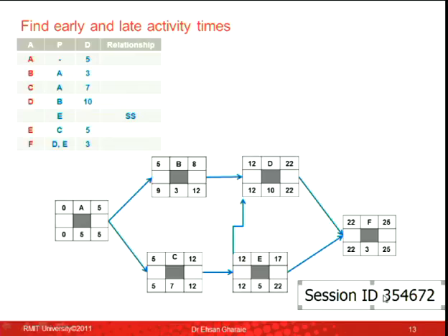Guys, let me explain to you. Please pay attention. It's just the business as usual. So ignore D and E. Ignore the whole table. Just look at activity B and A here at the top. The direction of the arrow goes from the predecessor to the successor. Agree? You go from A to B and you don't even think about it. Automatically you go A, B. Right? Again, here you go from A to C. You go from B to E. Same thing, you have to go from E to D. You go from predecessor to the successor.